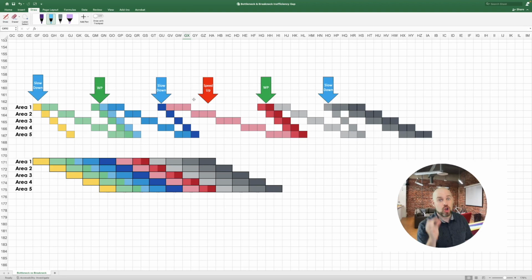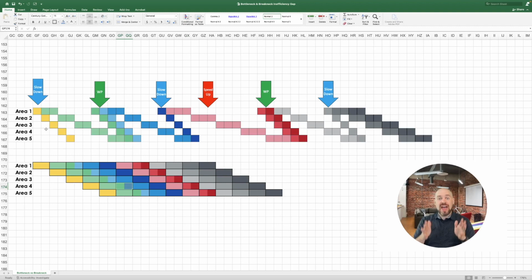This is how the goal and the theory of constraints actually apply to construction. So let's talk about the actual bottleneck activity here. We have this 3-block activity that is our bottleneck that we need to optimize in some way. The easy thing is just to say, well, add more resources, add more people, add more builders, right? So that can be the case, I think, about 50 to 40% of the time.